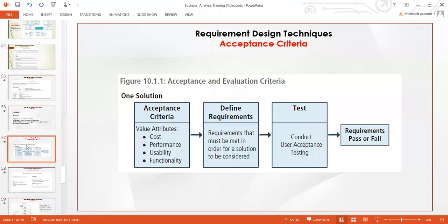So when you conduct that test, you need to look at whether it passed or failed. If it passed, then you log that it passed. And if it failed, you log that it failed. To do that, you must have developed a test case scenario or test plan. A test plan contains the user story, the acceptance criteria, the test case, and the test result. You know, so that's it. I will provide a copy of a test plan for you people to see how it looks. So that's how you do your user story.